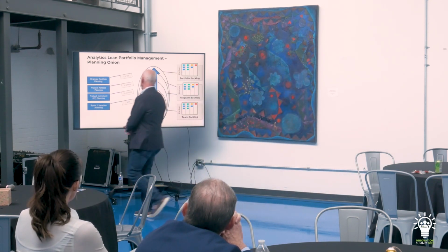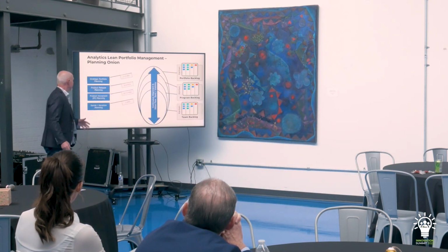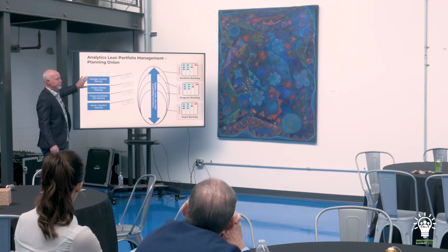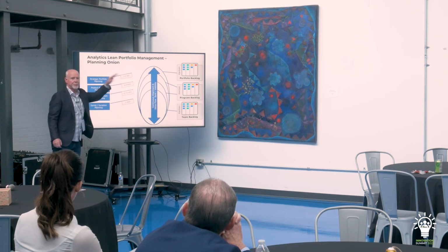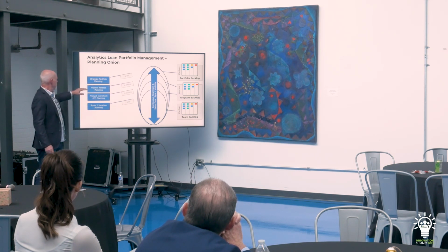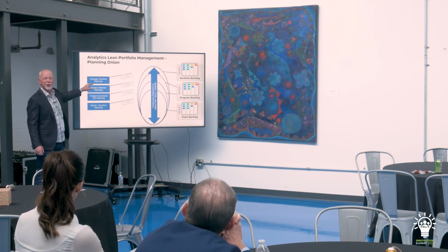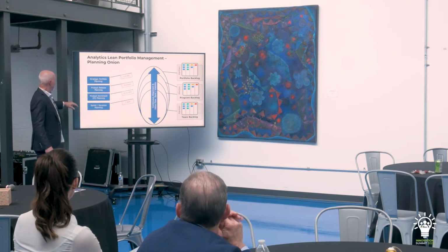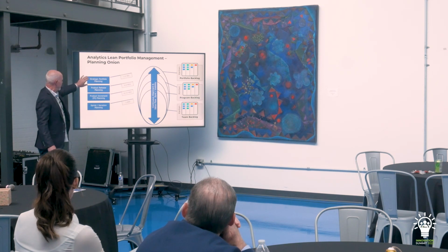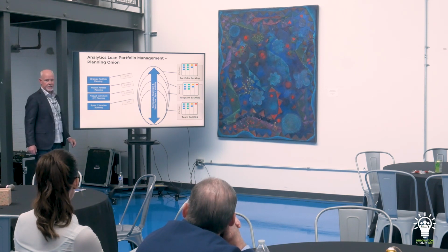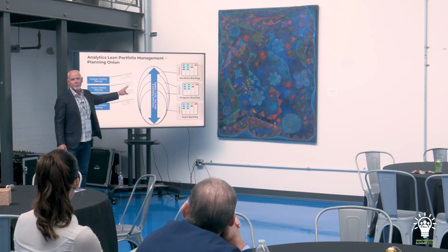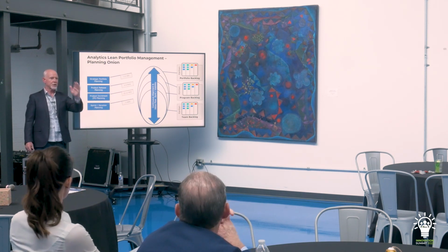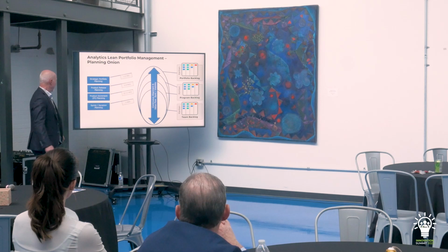So I lovingly call this the planning onion, right? I want a strategic portfolio, and that planning cadence has a 1 to 2 year planning horizon. You should revisit it at least quarterly, since it's only got about an 18-month window. And then supporting the portfolio is a set of product releases that we're looking to deliver between 6 and 9 months out. So what am I going to do over the next 2 to 3 quarters? I'm thinking out ahead, right?